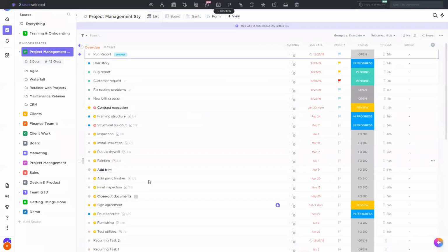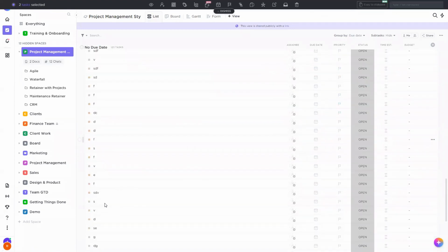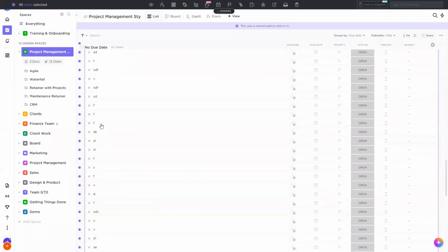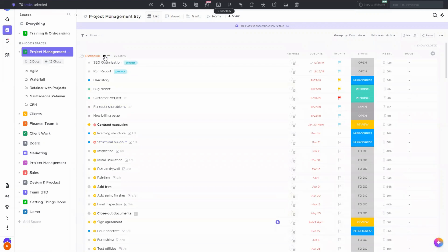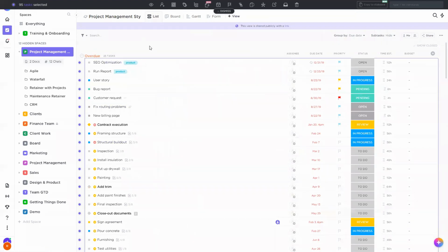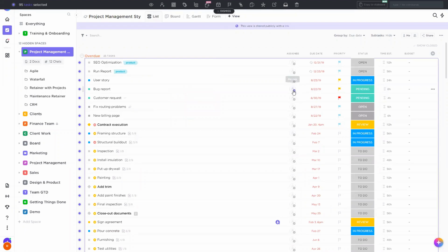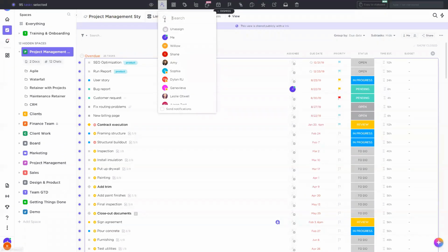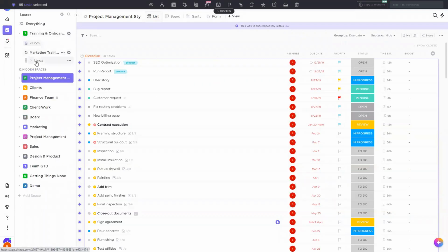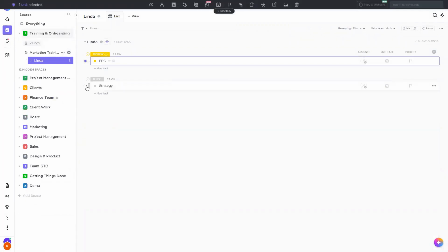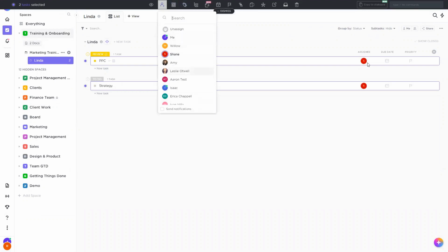So here I'm going to select lots, but actually I don't want to click on each single one. That would be way too slow. So what I'm going to do is hold down the Shift button on Windows and click here, and it'll select all that's in between. That can be really helpful. There's also a select all button on each group. Now that I've done that, I have this bar up the top. All I need to do to set assignees in bulk is go to the Set Assignees one and choose who to set. Now, if I already had some set, let's say this one already had me on it and I wanted to remove that, all you need to do is click it once, and that will set it for everyone. Then you get this little X. You can click on the X, and it will remove it. But let's say, for example, I want to set these all to Shane, because as we saw before, maybe this is all Shane's tasks. So I'd select them all, and then assign Shane, all in one go, which is handy.